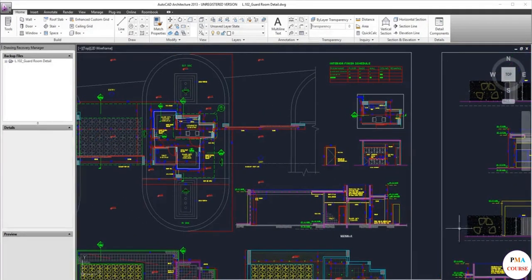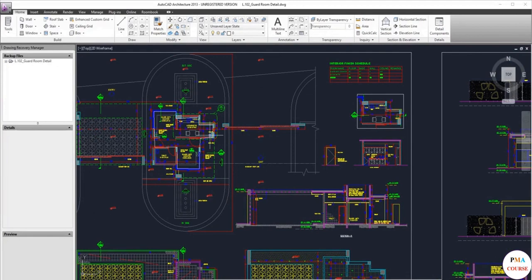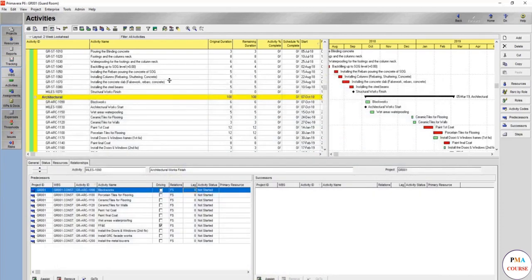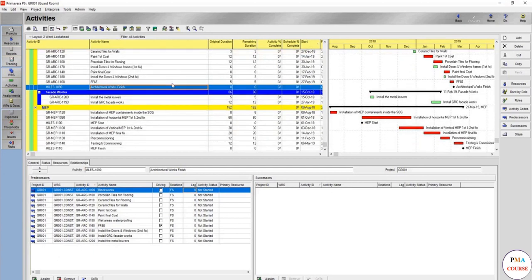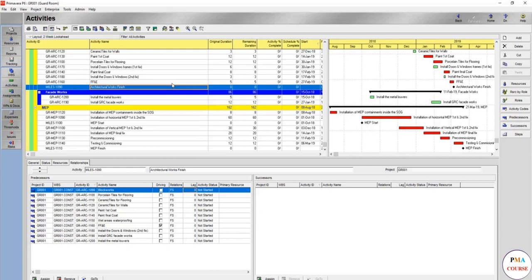See which one comes first in the priority list. If the drawings come first, always follow the drawings, then the BOQ to give you a hint. We'll see the BOQ in another lecture. Now you have covered what is missing in a new way and linked it. By the way, you figured this out after the activity codes, which is okay. You might find something while doing your project, installing resources, even while updating. This is the worst case scenario. You would prefer to find everything before submitting for review.